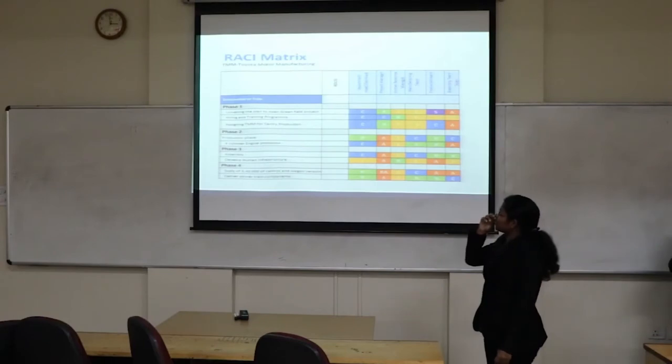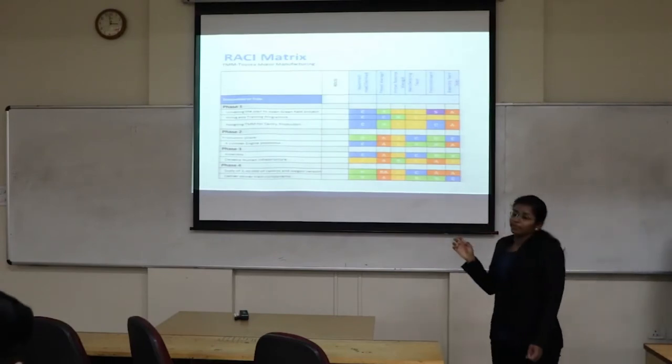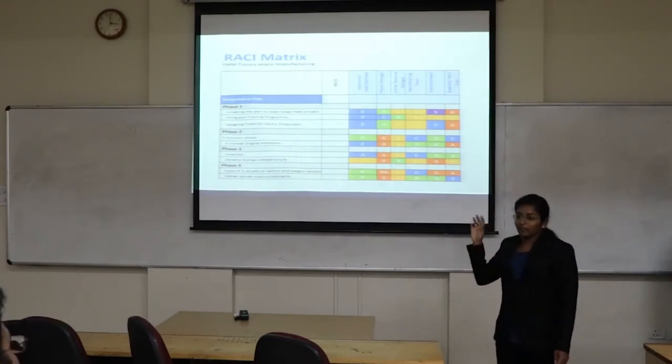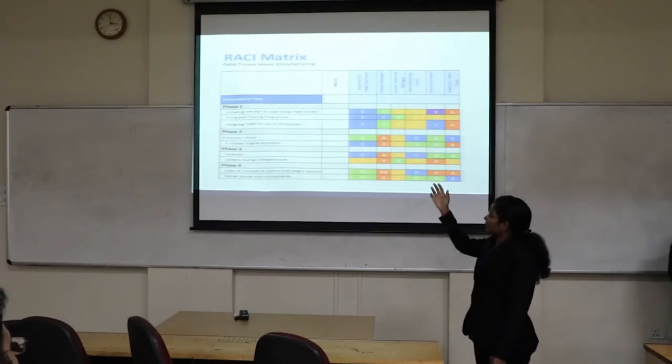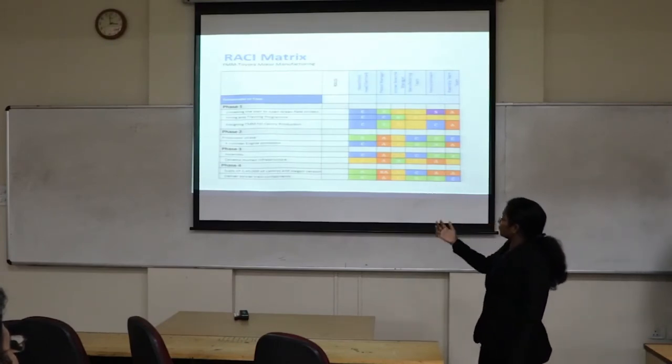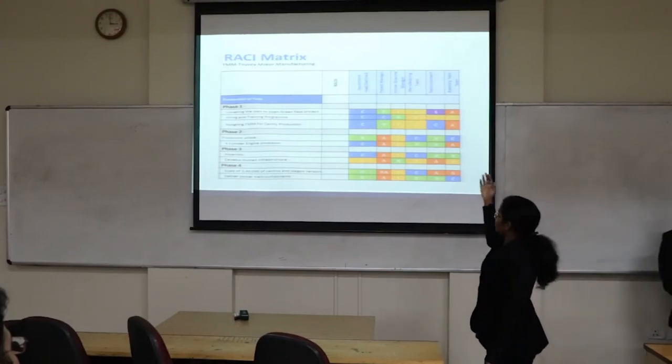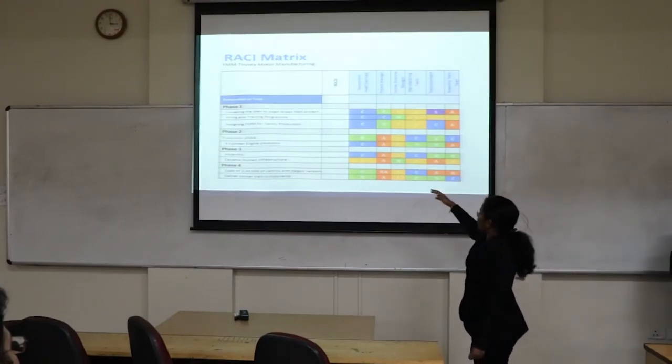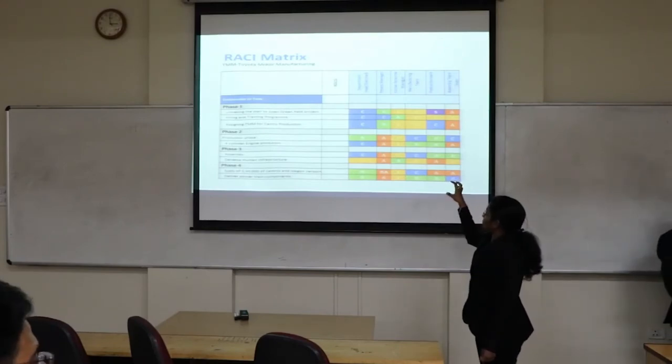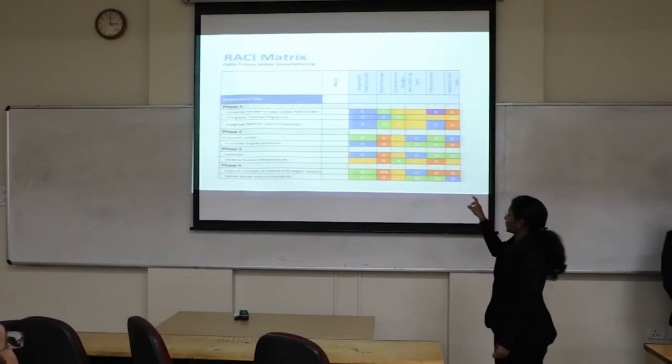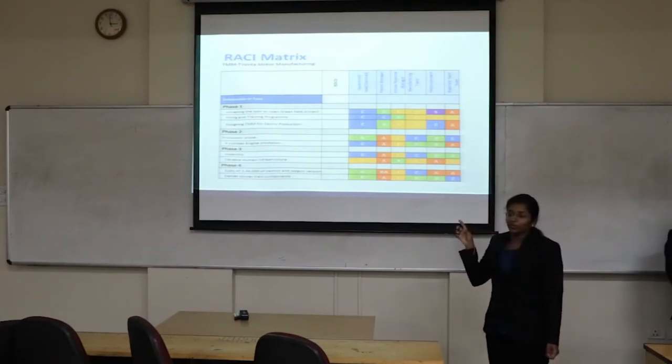Next comes RACI. Depending upon the milestones I have made this RACI. I have divided into phase 1, 2, 3 and 4. For those things, who is responsible, I have given the roles and accordingly I have pointed out who is responsible, who is consulted, who is informed and who is accountable for it.